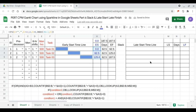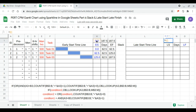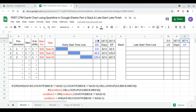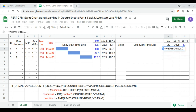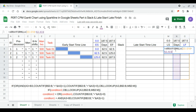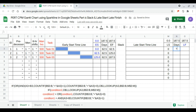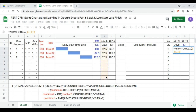We continue with the late start information. The late start columns are set equal to the corresponding early start columns for the first three items. Then the late start formula itself is an array formula: late finish minus duration. The duration in days should match between early and late.